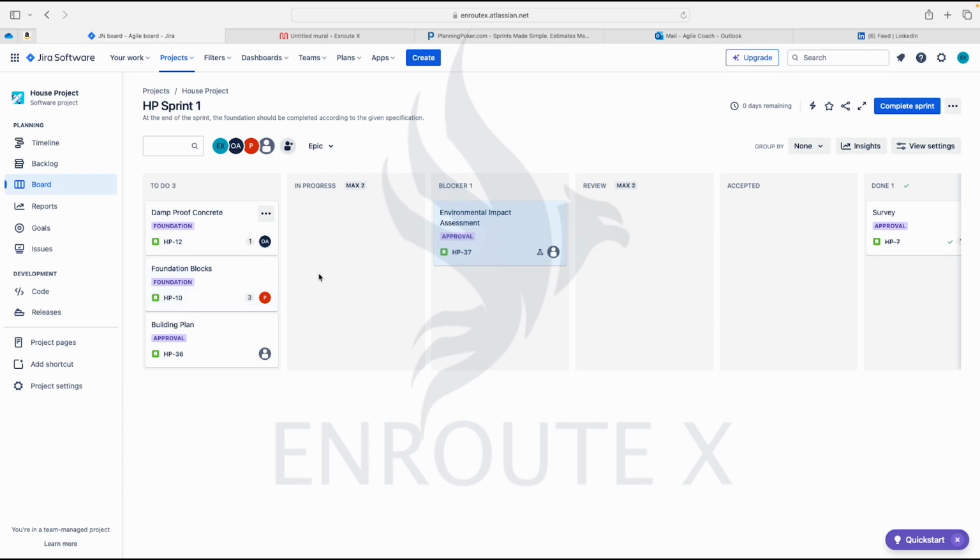A team could decide that each person takes turn to facilitate the meeting, or another team could decide that when one person speaks and talks about what he was able to do yesterday towards the sprint goal, what he is looking forward to accomplishing today towards the sprint goal, and if he has any problem or not, he could then pass that token to another person who takes the next turn to share. That's the second model that daily stand-up takes place.